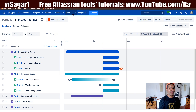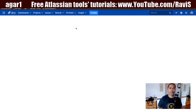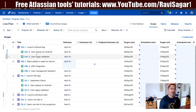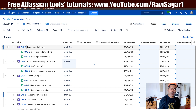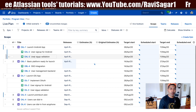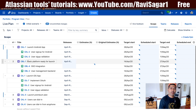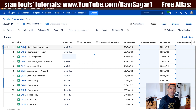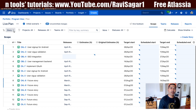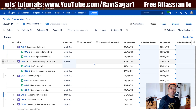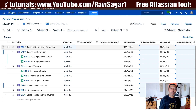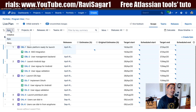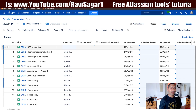But if you look at the life plan — the plan that we all are familiar with — it works as you would expect. I'm looking at 'Launch Android App', then I have 'User Signup Android' followed by 'User Signup Affiliation', and some activities like 'Basic Platform Ready for Launch' with stories like SSO integration. If I change my level to stories, the stories appear in the same order as under the epic. But if I move 'Basic Platform Ready for Launch' above 'Launch Android App', now we have SSO integration on top of user signup for Android. And if I change my view to stories only, this is now preserved.